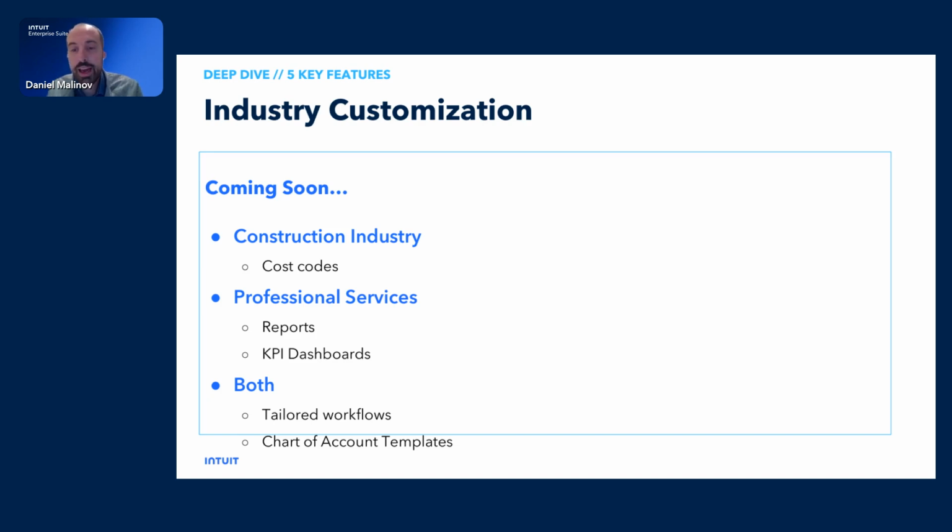And so typically they're categorized as costs such as materials, laborers, subcontractors, and equipment. And each code typically corresponds to a particular type of expense. These are generally modeled as numbered bundles or services in QuickBooks. And each transaction for materials, laborers, equipment, rentals, subcontracting fees should be assigned to specific cost codes. And this level of detail in expense categorization facilitates a clear understanding of where funds are being allocated, ultimately helping identify any budget overruns and underspends, for that matter, in real time. And so we are bringing those forward.